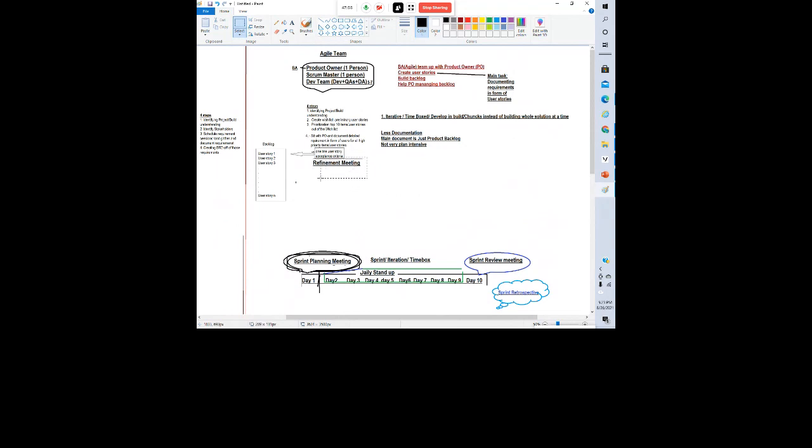So what does the product owner do after you have done your fourth step, and you basically have a backlog with 10 detailed user stories? That is being done. Then what does the product owner do while you have that ready? There might be 50 user stories, but only 10 that are detailed. It's not like you have to complete all 50 and then start; we prioritize which user story is more important to complete first.